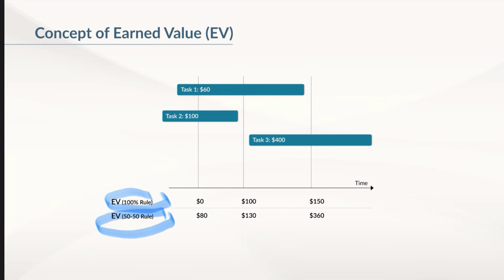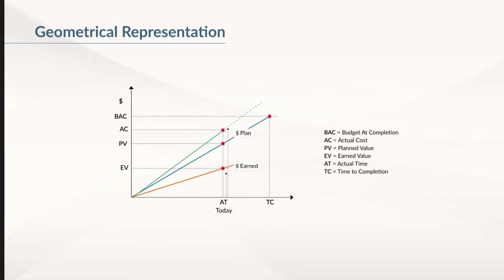And the proportionality rule, where you count credit proportionally to the degree a task is completed. This way, we have mapped the accomplishments of the team at a particular point in time into an unambiguous metric. We now introduce a graphical method of tracking progress of projects.